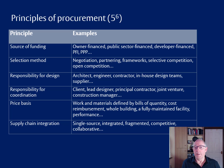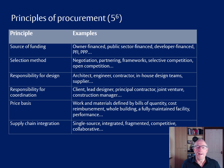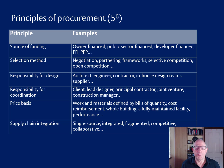When discussing the construction manager coordinating construction without being liable for execution of the works — if construction management is the answer, the question is how do we deal with the responsibility for coordinating the work on site, and again there are at least five choices. If performance-based contracting was the answer, the question is how do we calculate the price — is it based on work and materials in a bill of quantities, cost reimbursement, the whole building, and so forth. If the answer is integrated project delivery or integrated project insurance, the question is how are we integrating the supply chain, with a list of five options.